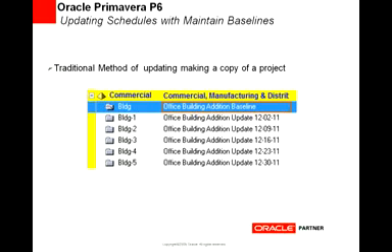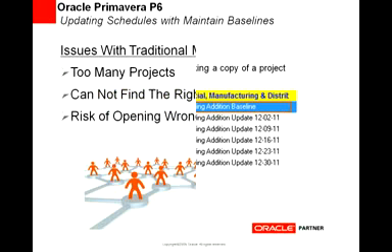And on my screen here, you see a screenshot of the EPS in P6 with the original project highlighted and then 5 updates made for each update. This works fine for some people, especially working in standalone environments, but it can create some issues in different environments.